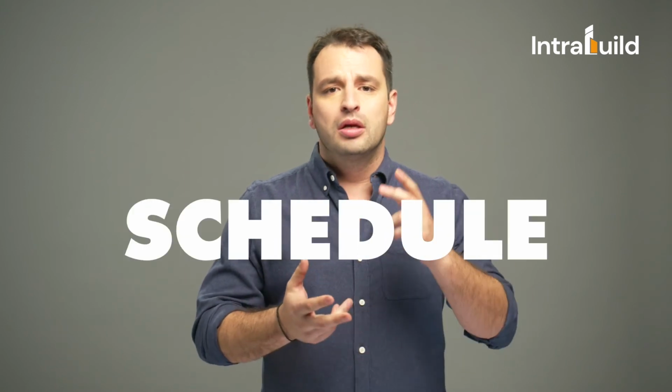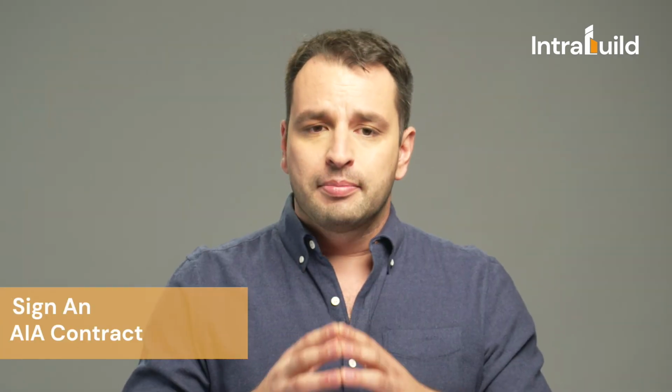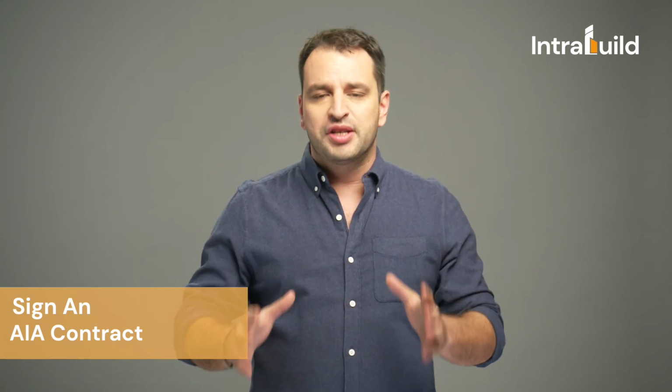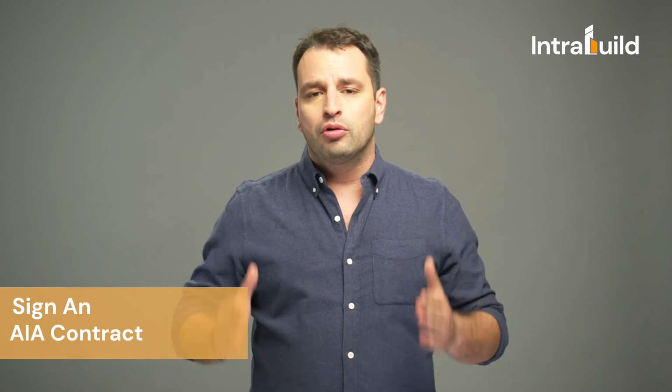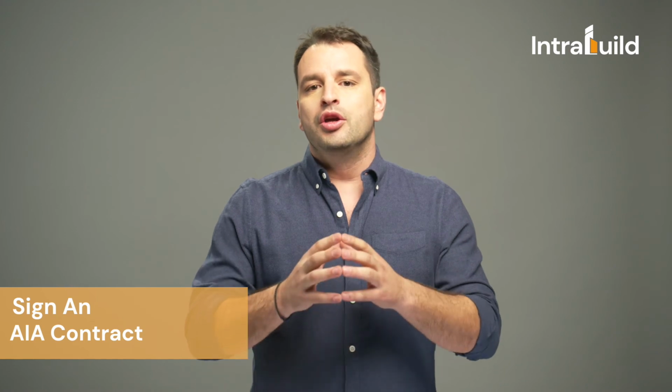The next step is to schedule a phone call with the general contractors that we are still considering working with. See who is the one that you feel most comfortable with. Ask them any questions you have about timing, schedule, project management, and what's their process on change orders. And after you choose who is the one you want to work with, sign an AIA contract. This is a contract that is made by the American Institute of Architects. They have a prefabricated contract with special terms that are great for you and your contractor. In case there's a dispute and you are into an AIA contract, your architect has the power to resolve the matter.